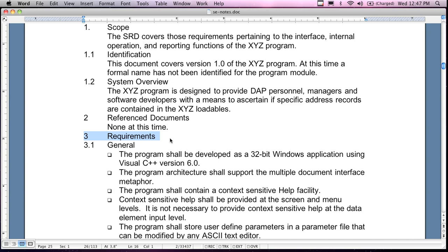And the documents, unfortunately, flow together. Like, the requirements has to be done before you can do the analysis. The analysis needs to be done before you can do the design document. So that's what actually makes this class kind of interesting if you are working in a group. You actually kind of have to coordinate, and then you realize, oh, project planning. Oh, all the other things that are associated with working with groups and people.